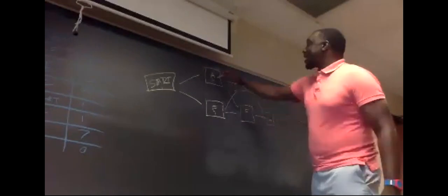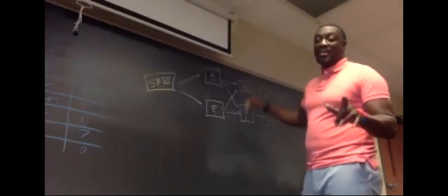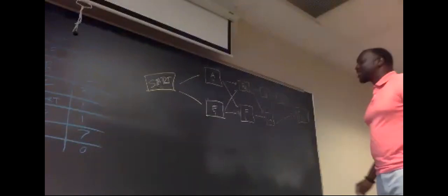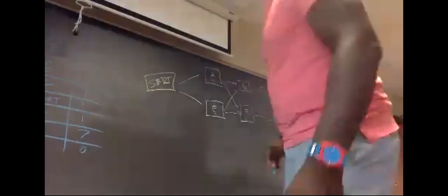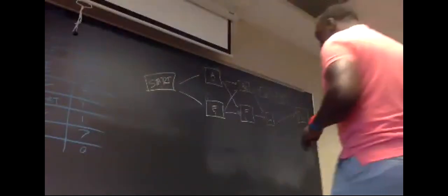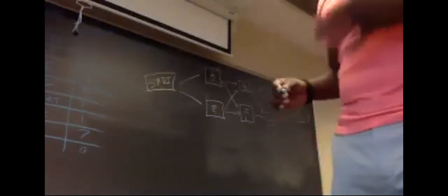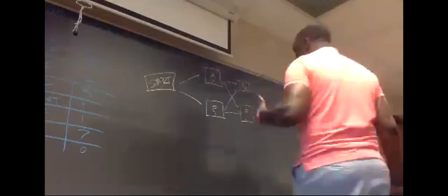Now I can bring the 6 over, or can I? Can I bring the 6 over from A? No, because it goes to F, right? Right. So we have what is that called? A convergence point. Remember, when you have multiple arrows from one box, it's called a convergence point. When 2 points converge on a forward pass, which number must I use? The higher or lower number? The higher number. Very good.